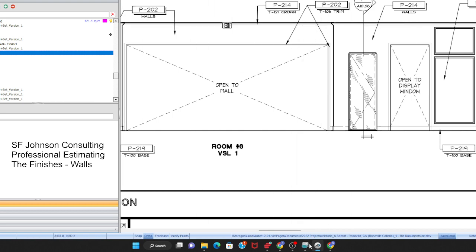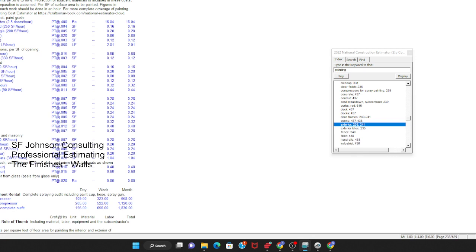And as you saw from the cost book, linear 0.05. That's the most out of everything. Man hour totals 0.05 to paint trim, to paint trim, and post linears, 0.050 per unit per linear foot. Look at all of the other ones that you can paint: a ceiling, a wall, baseboards. But the trim post, you have to go all the way around in a circle, right? So that's why. But again, all of your linear ones are very labor intensive.